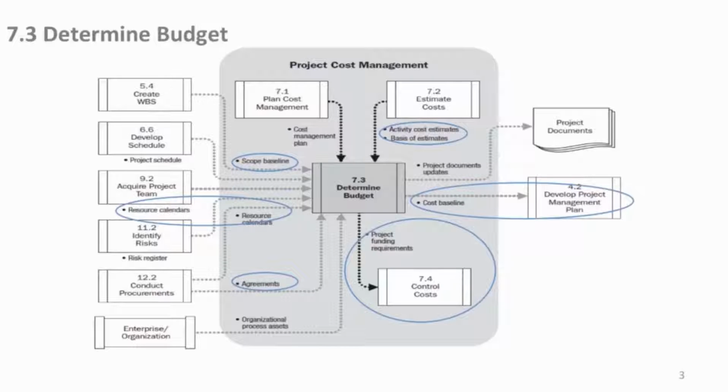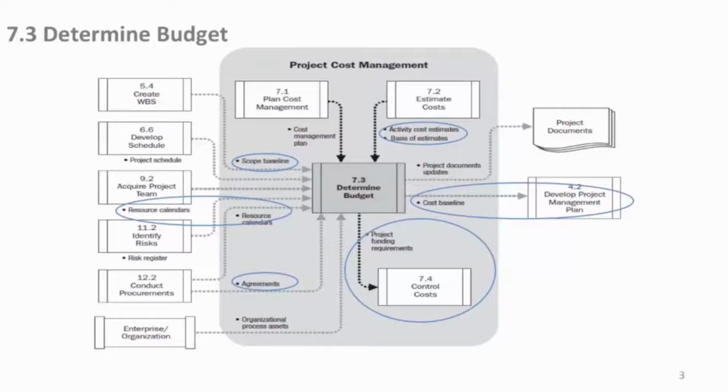But agreements being the nature that they are, change controls go on. You change what you buy quite a bit sometimes, and they all need to be reflected in a timely manner, progressive elaboration again in our budget, especially before we baseline it. So you want to get as good as you can before you baseline, because you want to avoid as much as you can changing any baseline so that you can manage out all these distractions of changing things. I mean, that sounds like a utopian world, and in many respects it is, but do the very best you can to minimize all those kinds of disruptions of having to re-baseline.